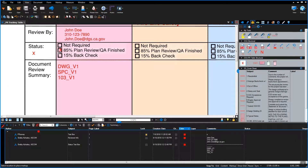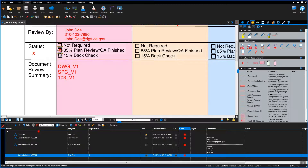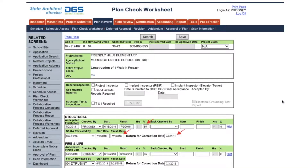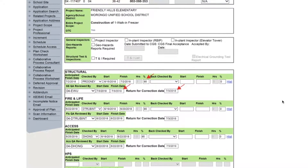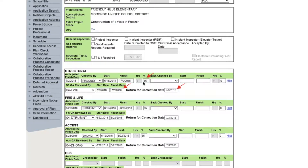Update the plan review tracking table: place an X in the 85% plan review QA finish status field. Update the eTracker plan check worksheet: enter percent complete to 85%, enter the QA finish date, and enter the return for correction date.